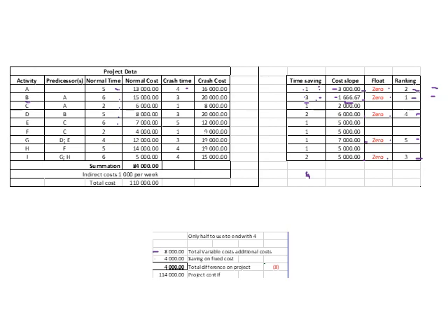Okay, and then the reduction in our fixed cost is just 4 times 1,000. So there's a cost saving here. So you can see what the implication was. If this was, for instance, 3,000 Rand, we would have gotten a cost saving on the project. If it's reduced, it would have amounted to 12,000 Rand of fixed cost savings that we could have put in here.